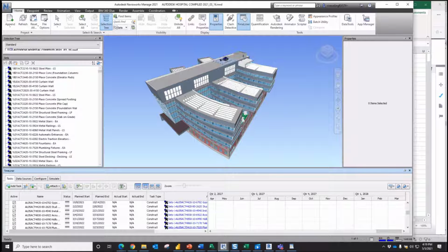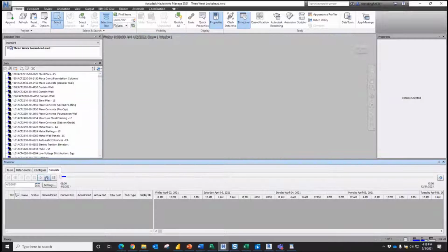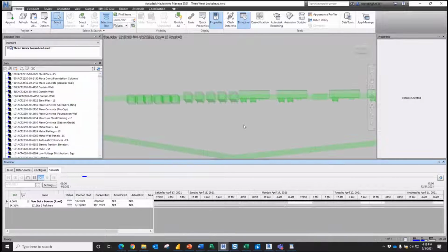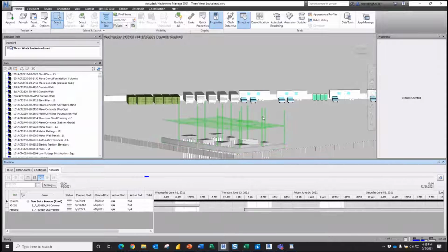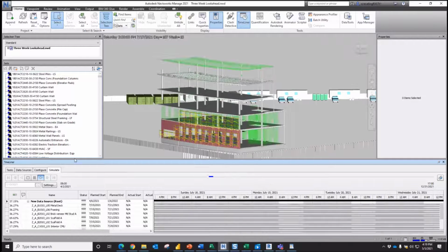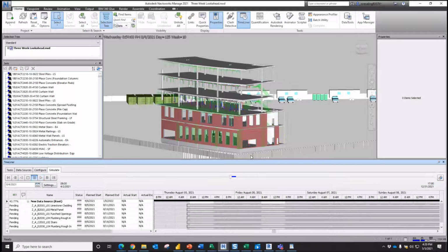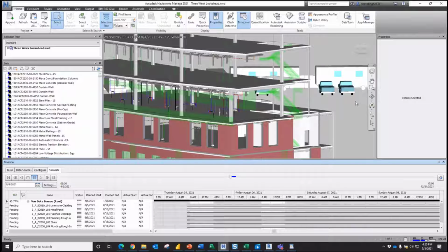But in constructing a project, it's typical that we work with a 3-week look-ahead schedule, and that's the series of game time decisions that get made day in and day out to actually construct the project. When looking at the project through the lens of a 3-week look-ahead, we can see more detail. And as Vince spoke, conversations start happening that wouldn't otherwise happen when you can bring visual context of other people's work into place.